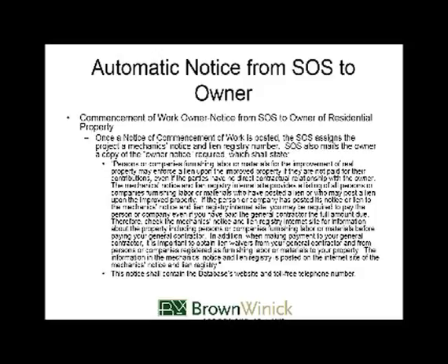The Mechanics Notice and Lien Registry Internet site provides a listing of all persons or companies furnishing labor or materials who have posted a lien or who may post a lien upon the improved property. If the person or company has posted its notice or lien to the Mechanics Notice and Lien Registry Internet site, you may be required to pay the person or company even if you have paid the general contractor the full amount due. Therefore, check the Mechanics Notice and Lien Registry Internet site for information about the property, including persons or companies furnishing labor or materials before paying your general contractor.